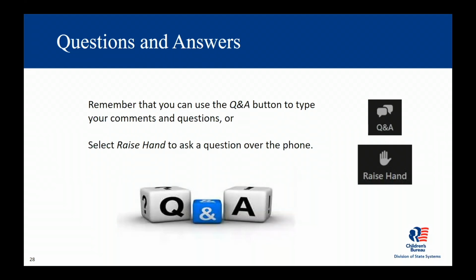They'll say just what I literally said: be able to take an intake, be able to assign a case. And your vendors will all be able to very honestly say, yes, yes, yes, yes, I can do that. But when you then go in and say, I need to be able to assign a case geographically, oh, okay, that's not out of the box. We'll have to customize that. But they don't ever usually get asked that detail in a lot of the requirements.